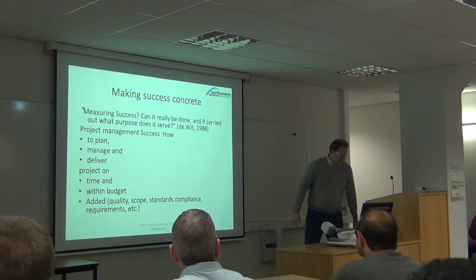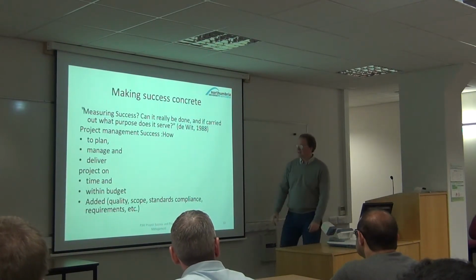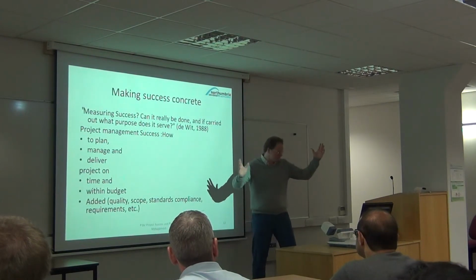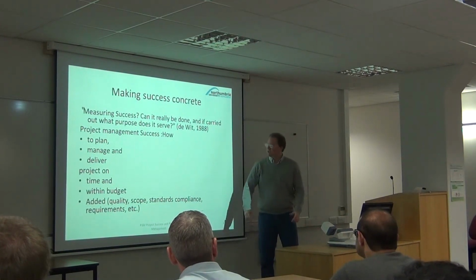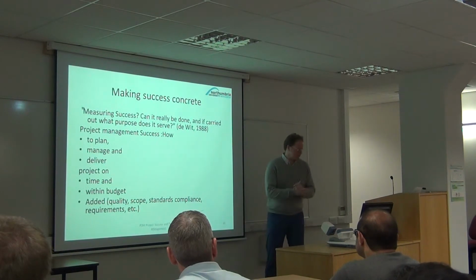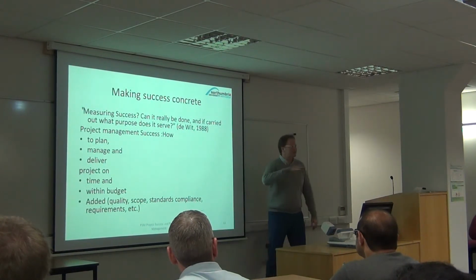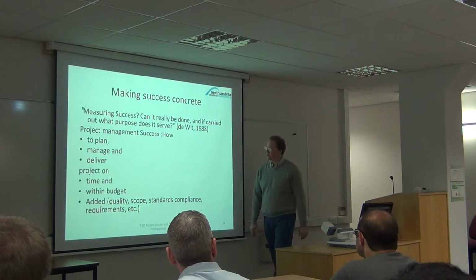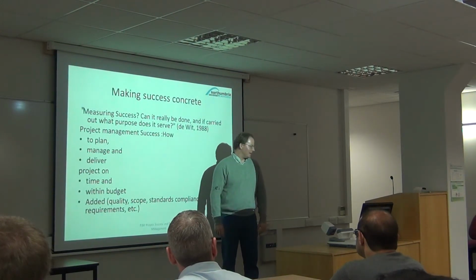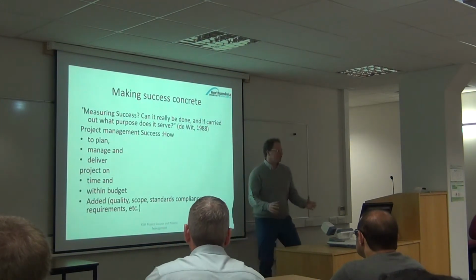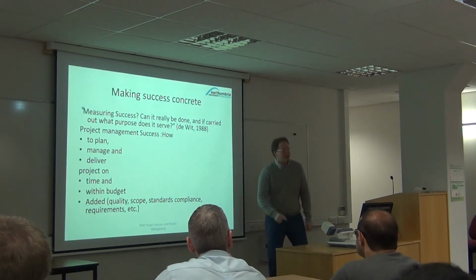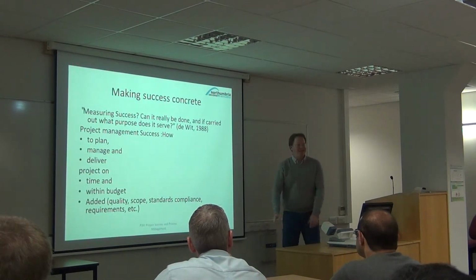And then within 2 months, pretty much all the solar panels didn't work anymore. The engineers said, what? We have guarantees for 10 years, it should be fine. Then people came to fix it. They realized that the dust from the sand had settled on all these wonderful solar panels and, quite frankly, blocked the solar radiation. In a nutshell, they then tried to convince the family that once a week, they have to climb on their roof and clean it.